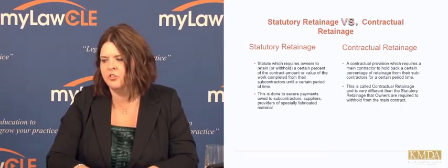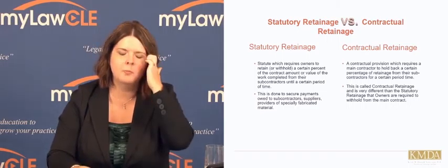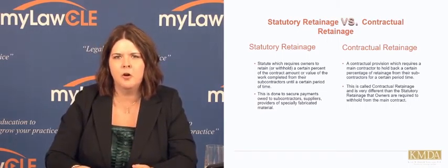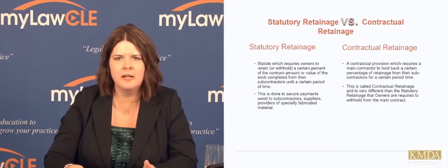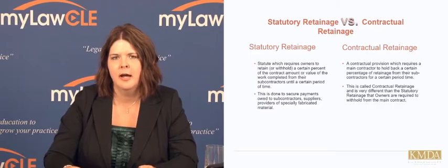And so statutory retainage is where a statute requires that a certain percentage be withheld from certain suppliers. But contractual retainage is where you agree by contract, or your clients agree by contract, that a certain percentage can be withheld from their contract, and it will be withheld for a certain period of time, and the contract sets out the terms which they agree to.